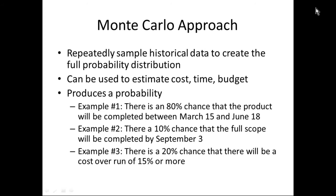You will now know the exact probability that cost, time, and budget will be on schedule, and you'll understand everything about the entire distribution. You'll know the probability that you'll release on any particular date, the probability that the budget will be ahead by 5%, 10%, or 20%, or behind, and what the chances are of releasing between two dates or that the full scope will be completed by a certain date.